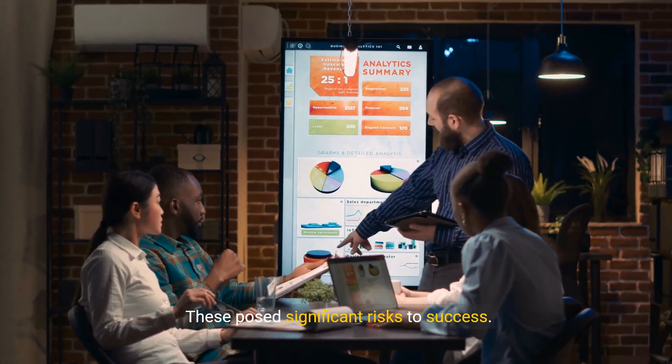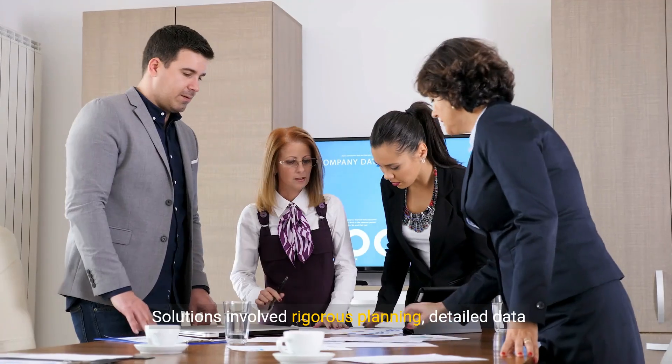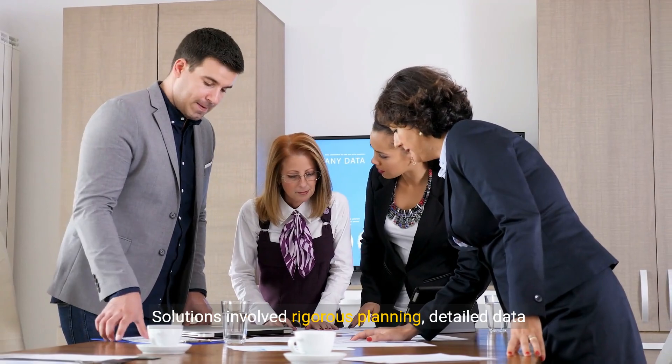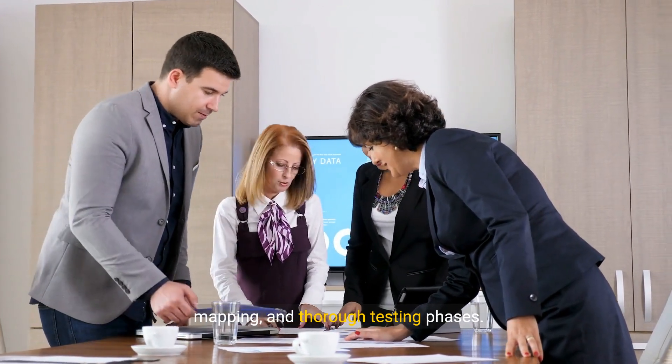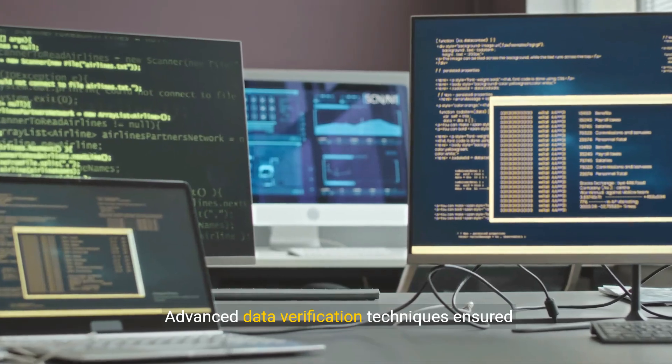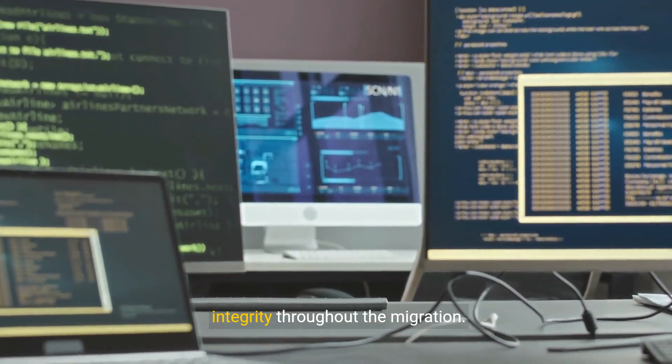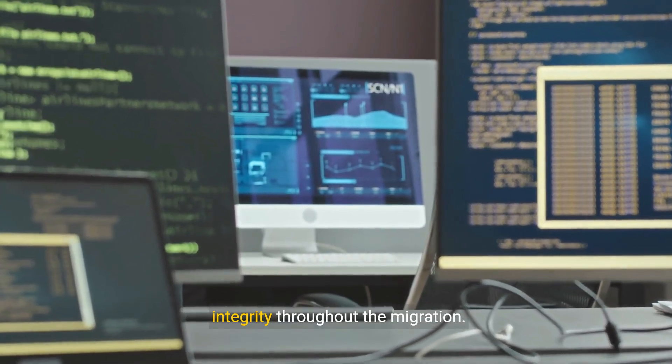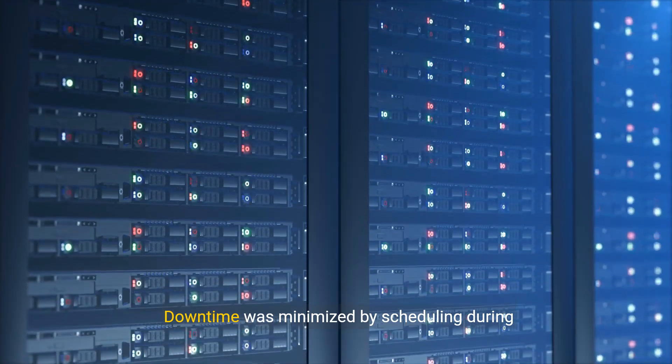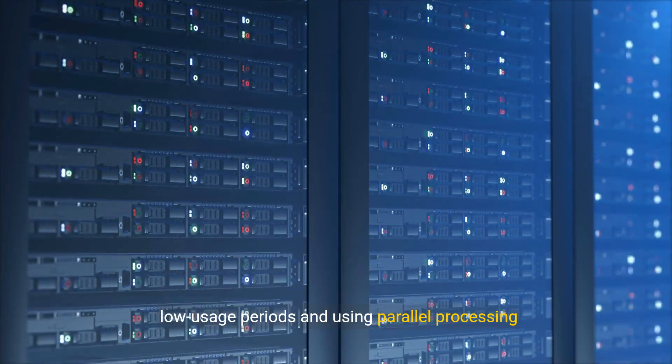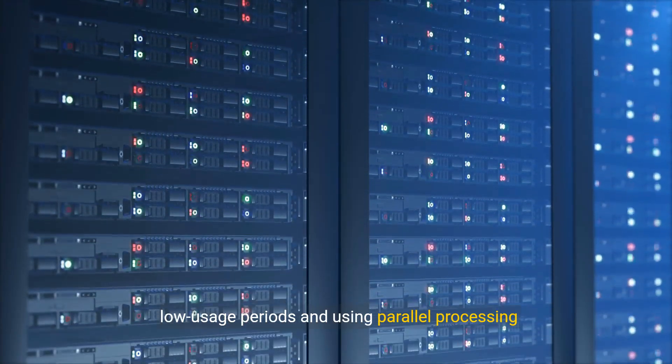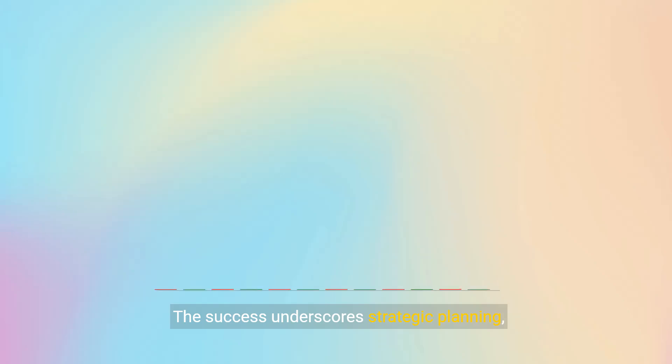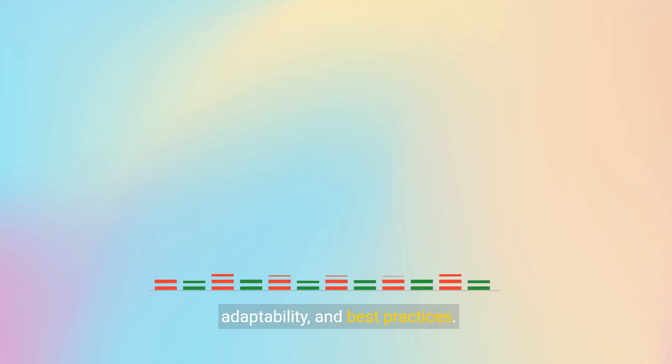Solutions involved rigorous planning, detailed data mapping, and thorough testing phases. Advanced data verification techniques ensured integrity throughout the migration. Downtime was minimized by scheduling during low usage periods and using parallel processing methods. The success underscores strategic planning, adaptability, and best practices.